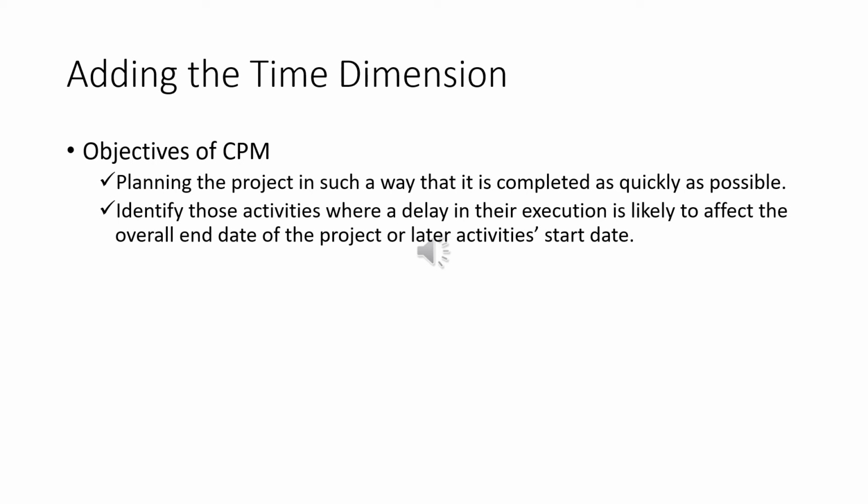and identifying those activities where a delay in their execution is likely to affect the overall end date of the project or later activities' start dates. The method requires that for each activity we have an estimate of its duration. Estimate the duration of each activity.